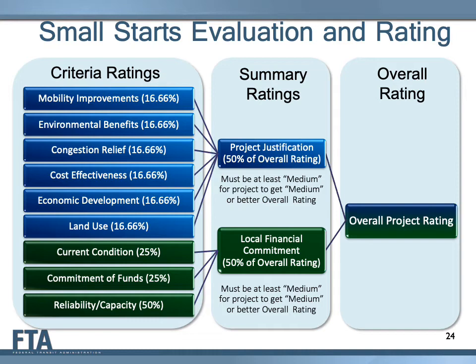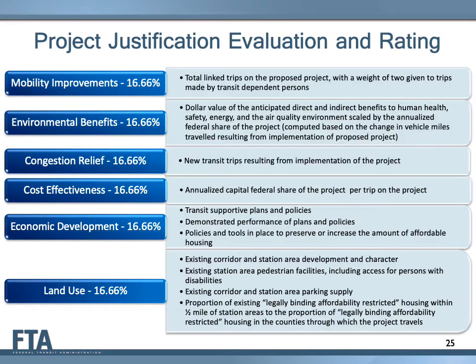However, FTA requires that a project receive a medium or better rating on each summary rating to receive a medium or better overall rating. In other words, both project justification and local financial commitment are important components to a successful project. A poor rating on one cannot be offset by a good rating on the other. Each criterion will be discussed in more depth on the next slides.